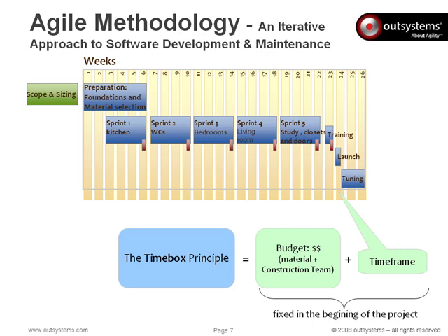In respect to the time box principle, it's key to perform regular feature adjustments, sacrificing low priority, low value features for high value needs. It is also important to have a strong understanding of external dependencies and other risks that can impact the project while optimizing all opportunities to drive efficiency.